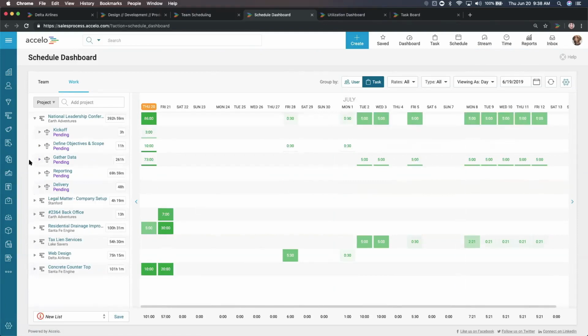That's really going to give me a solid idea of the different types of work that we're doing, how long that work typically takes us, whether it's a website design or a network install. I can see, those types of projects typically run us this long. Therefore, Mr. Customer, I can start to commit to you that we can get your project kicked off after some of these wrap up, at the end of this month.